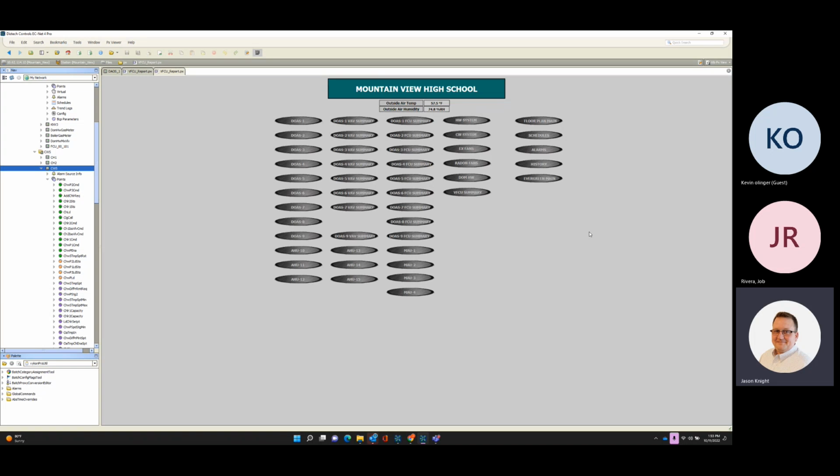And then, as always, we're here working with you guys after everybody's left and gone and the project's done, but realistically there's probably going to be 3 or 4 more full-day training events. But contractually, what did the architect and engineer put in there? Did they put 4 hours, 16 hours, 8 hours? I couldn't tell you, but it's going to take 4 or 5 days to get through all this.